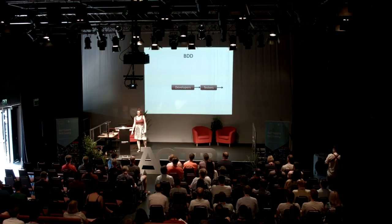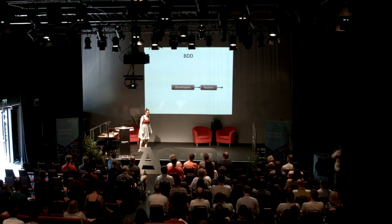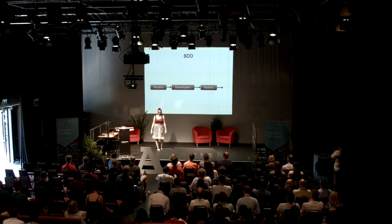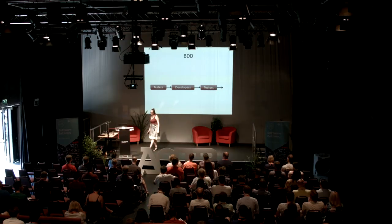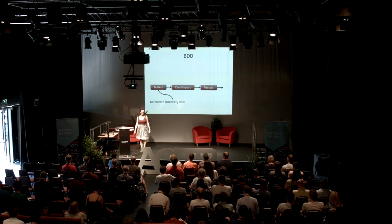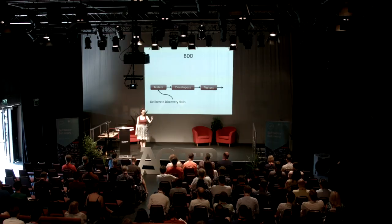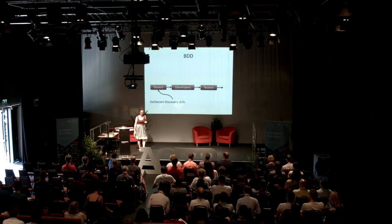So what we do instead with BDD: we get the testers involved first. The testers are perfectly capable of telling us how they're going to discover what's wrong with our code. And if we're cunning and we ask them to apply those deliberate discovery skills early — 'can you think of any scenarios we've missed? Can you think of anything we haven't considered?' — the testers go: 'yeah, you're going to miss this, this, this, this, and this.' And then we stand a much better chance of getting it right.